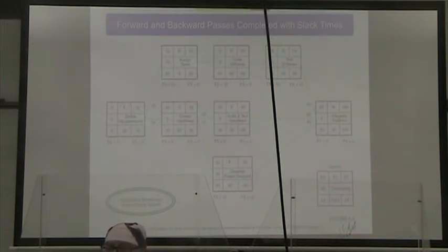And we have to be able to integrate the system within those 15 time periods, right? This other stuff, we could start 15 time periods late. If that's weeks, if that's days, we could start 2 weeks late on this and still be in good shape, right? But any place we have 0 for the slack, we have got to make sure that it is happening on time.